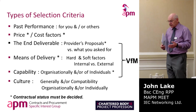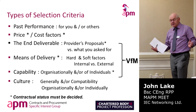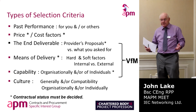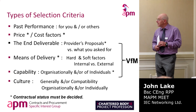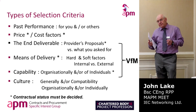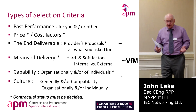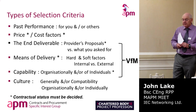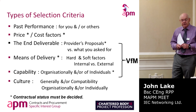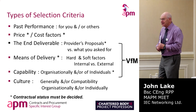For example, in research, and particularly in defence, which is where I'm working at the moment, we're trying to diversify the supplier base, i.e. not go to the same big companies that we all know that do defence all the time, but also bring in universities and small SMEs to do the work. The problem there is, of course, there are certain constraints, in particular in the defence industry but also in other industries, in security, management of data, and that kind of thing. So if you're going to go wider than the norms, then you have to have systems that those companies can use, and add those into your calculations so that you provide the tools that are necessary. So that's an additional cost. But it could end up that you get far better ideas coming in to your work, in which case that pays off.